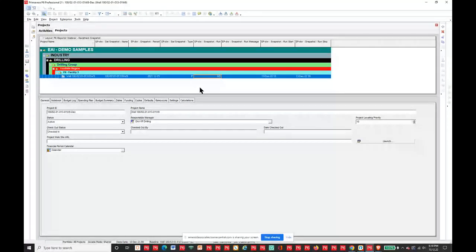So maybe I've got an activity that in my current update is 3 days behind, just as an example. Now, was it 3 days behind the last update, or did that all of a sudden happen? Those kind of things you're usually looking to track pretty closely. So being able to compare snapshots becomes increasingly valuable as you set up those types of reports. And there's many other things that you can end up comparing depending on what piece of information you need to focus on. So this should be through right away here.